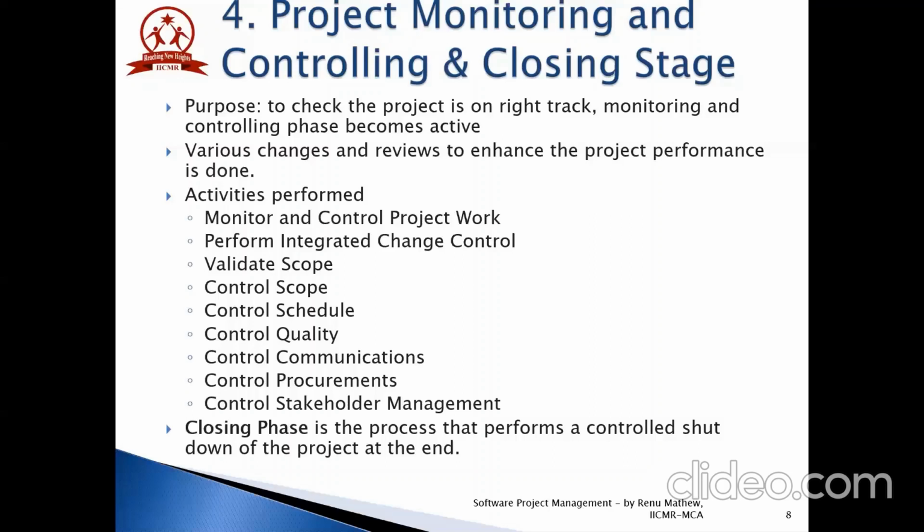Control communication can be in any format. It can be trending data, tabulated information, S-curve, dashboard formats, or you can use histograms. In control communication process, work information is taken from various other processes and the performance report is used as an input for various monitoring and managing processes. The main deliverable from the control communication process is the performance record.